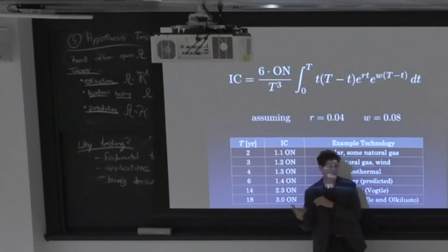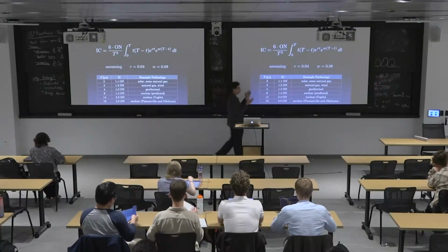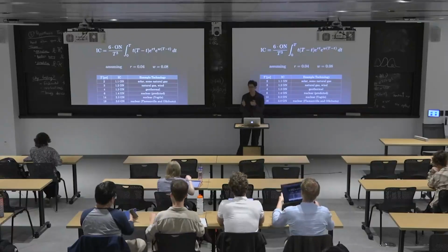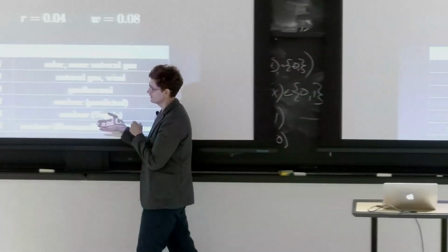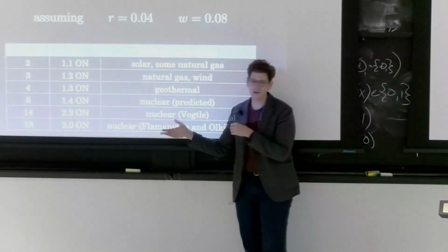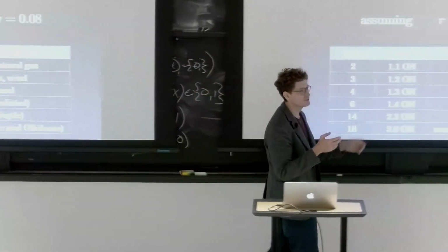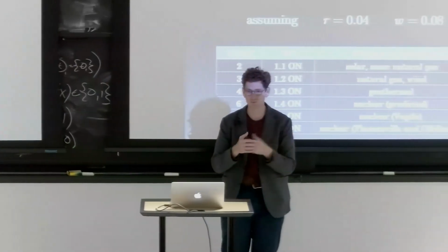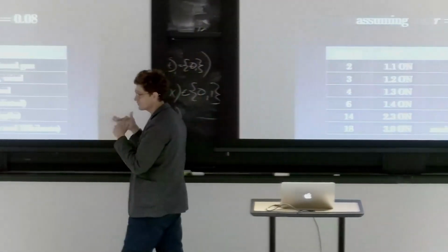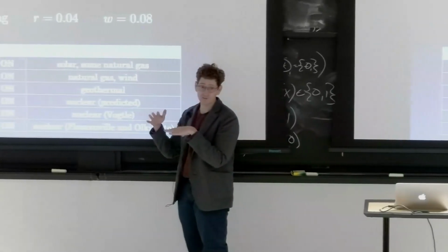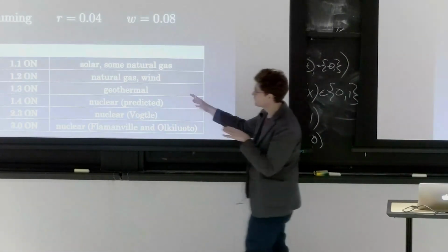This is one of the reasons why we're interested in moving towards factory fabrication, because these long construction timelines for stick-built technology are driving the costs way up, 2.5 to 3 times what it would be if we were able to build this very rapidly. That's the motivation. There's a secondary trade-off about factory fabrication that we'll talk about in a couple of classes. But now you know where it comes from.